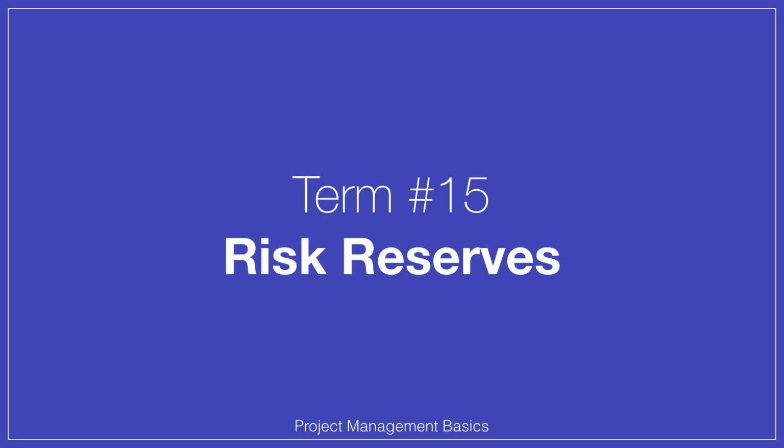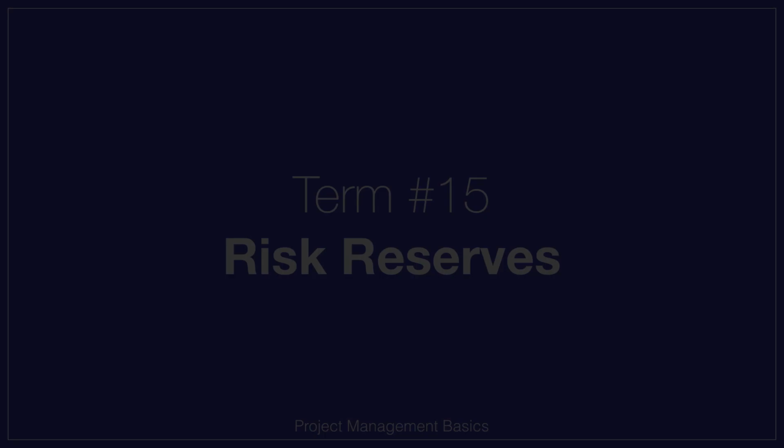Okay, we'll end up with the risk reserves. These are just your reserves of time, money, or resources to tackle a risk if it happens or to overcome it proactively. Do not treat your risk reserves as a pool of extra resources that you can use at your discretion to keep the project on track. Otherwise, you'll quickly lose control. A risk reserve is dedicated for a specific risk. It should be clearly shown in your project management plan.